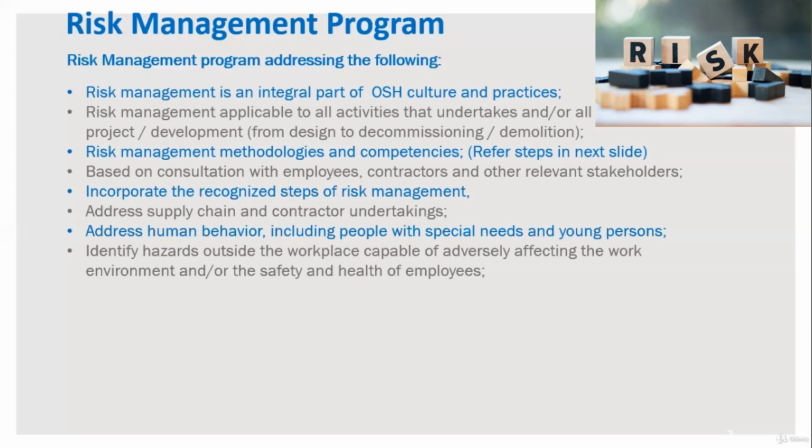Suppose our work is nearby a quarry or nearby a hospital. Because of their infectious diseases, our people should not be infected. So you have to identify the hazards outside your workplace also sometimes, or the environment of that workplace. Like, as we discussed, where a quarry is operating, your building is shaking all the time, and sometimes even rocks may come and fall on your building top.